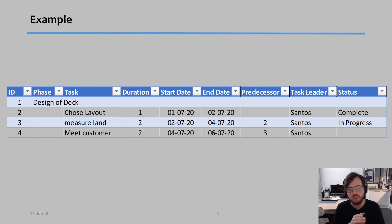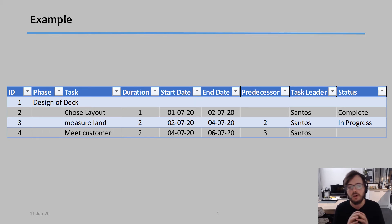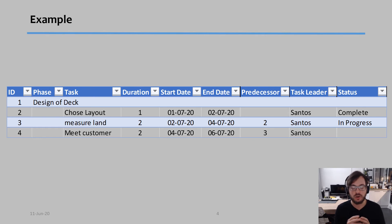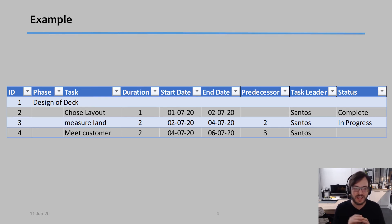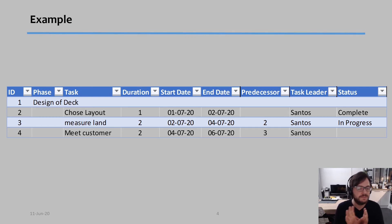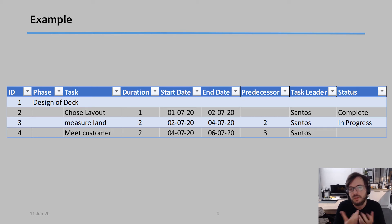So I defined it by days here. So for example, to choose the layout, I need one day, to measure the land I need one day, to meet the customer, I need two days. I know the example is a little bit ridiculous, but again, it's just an example.